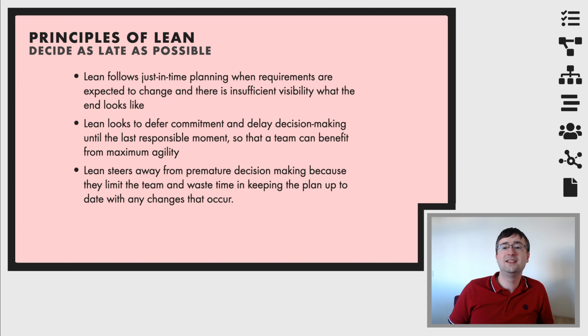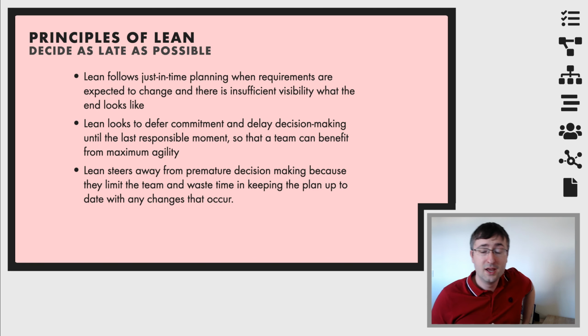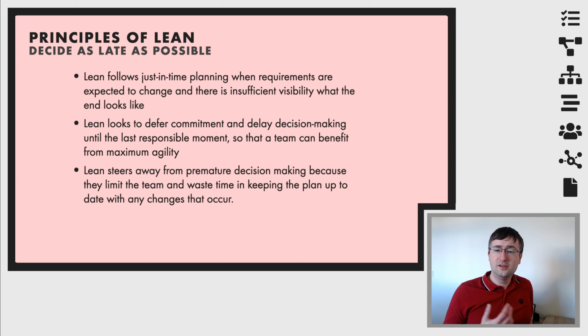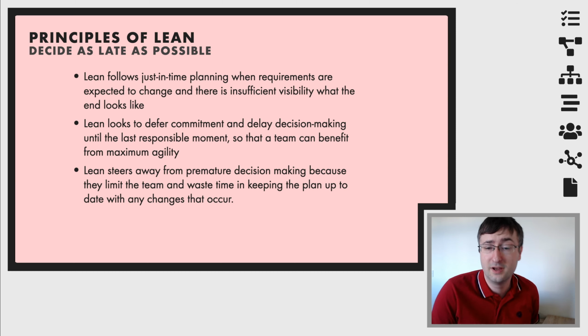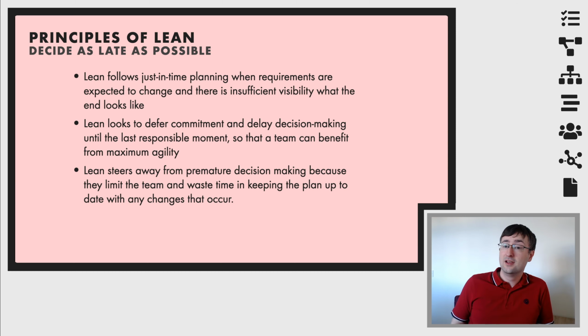We also want to try and decide things as late as possible. If you decide something and start working on it, there's a chance that someone will tell you, we could do this another way. If you leave this until the last minute possible and follow just-in-time planning, requirements are less likely to change. Okay, and with that, there's very, very little chance that you will have to then create additional materials.